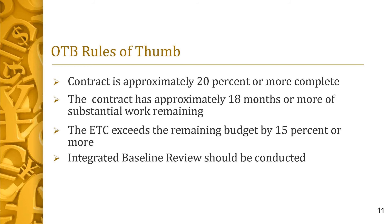How much should the ETC be over and above the BCWR? A good parameter is 15%. These rules of thumb are based on the cost trade-offs involved with a total project OTB decision. An OTB is costly in that it takes up to six months to implement and requires a total project assessment of the future to a new schedule and resource plan. There should be time remaining and adequate budget where performance measurement benefits outweigh the cost of implementation. The integrated baseline review is a proven tool to assess the remaining technical scope, cost, and schedule risks associated with the integrated PMB. The integrated baseline review approach includes an integrated assessment of the achievability of the baseline plan for accomplishing the remaining work, which is a key to determining the need for an OTB and/or OTS. Check the snippet library for snippet 1-8, the integrated baseline review process, for additional information.